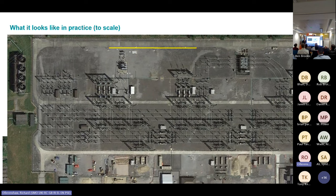That sounds like it's not a big thing, but actually when we looked at PSU1, just the cost of the land purchase, the cabling to places you could buy land, the roads to places where you could buy land to fit the AT substations in was actually a major driver of what would have been the AT cost.